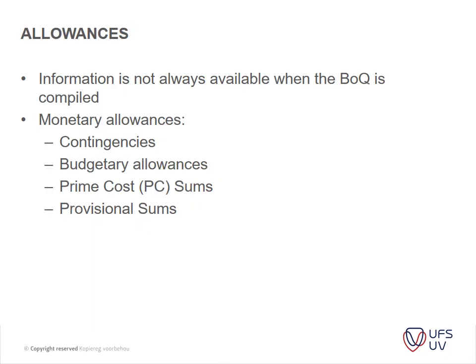Information is not always available when BOQs are compiled, so monetary allowances are used — usually in the forms of contingencies, budgetary allowances, and prime cost sums. Prime cost sums are the basic cost of items — for instance, what a standard hollow core door from a manufacturer actually costs. You then allow an item underneath for the contractor to mark up installation costs.